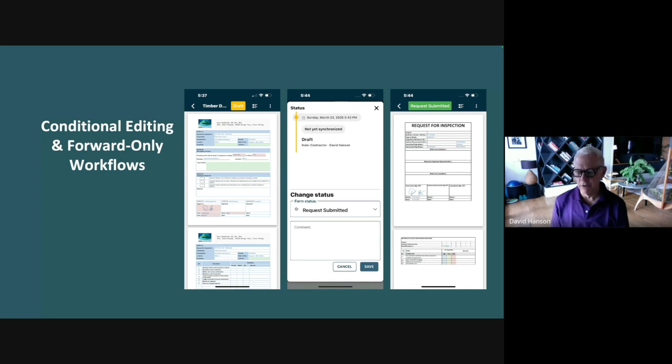So basically you say, okay, it failed because of the grid and dimension. And so if I fail this, then it needs to be re-edited to pass. And so you fail that inspection, the client developer, whoever's doing this inspection, verifies that it was corrected, and now they can proceed to click pass and change the workflow again.